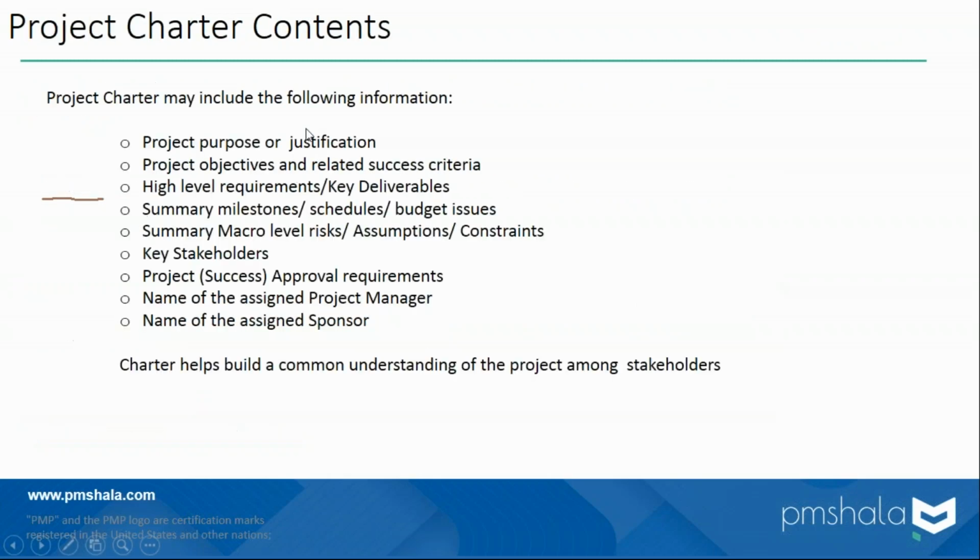Look at the contents of charter we just studied, these things are there. Now watch, much of the information needed for your charter is already contained in the business case. Why we are doing the project, the justification, that's very much there in the business case. The budget, we have written that in the business case. What are some risks in the project, that's written. Maybe some high level requirements as well. So much of this information is already there in the business case.